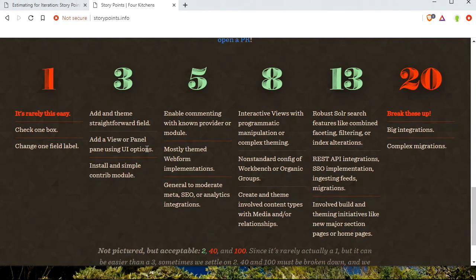And the next thing you asked was assignments. Scrum and Agile methodology generally would propose self-guided or self-managing teams. So they should pull the work out of the sprint backlog as they go. And they should always pull something from the sprint before they try to pull something that is not in the sprint, which means maybe if there's only 1 ticket left and I'm the one with the free time, I might be doing something outside of my wheelhouse, which is only vaguely related to what you asked. But team members, in my opinion, should assign themselves.